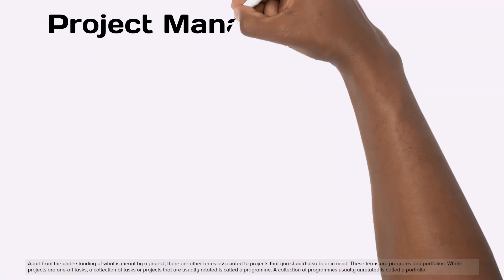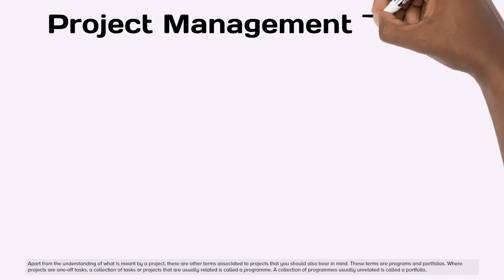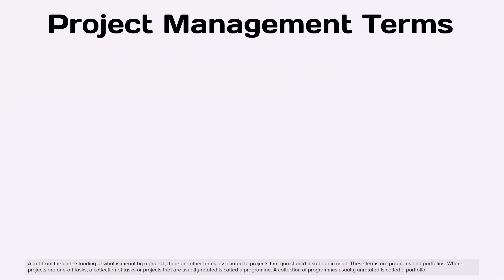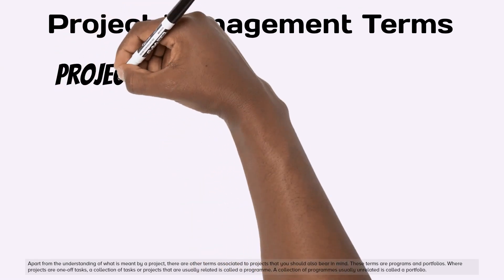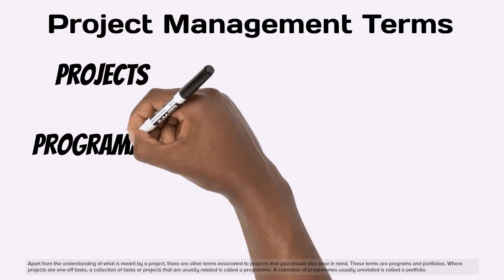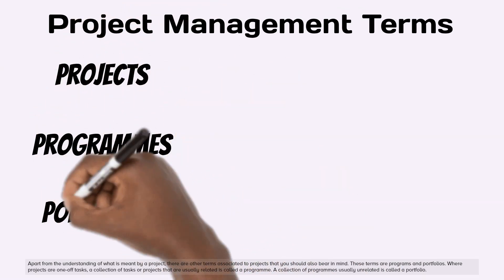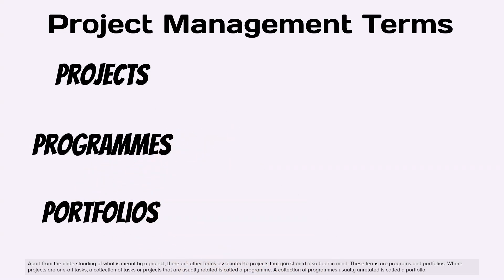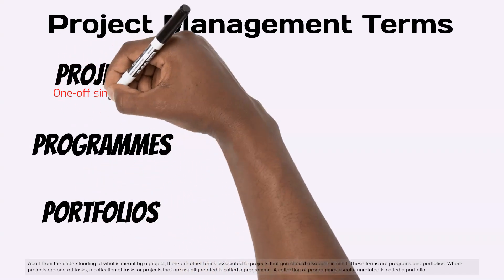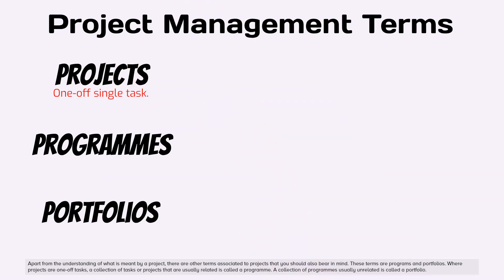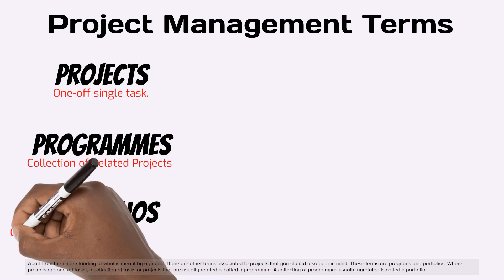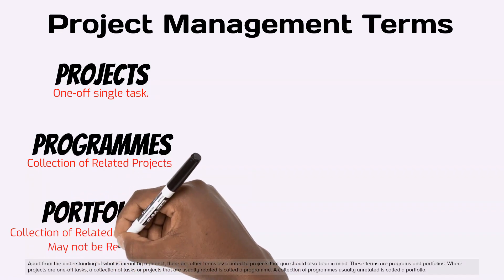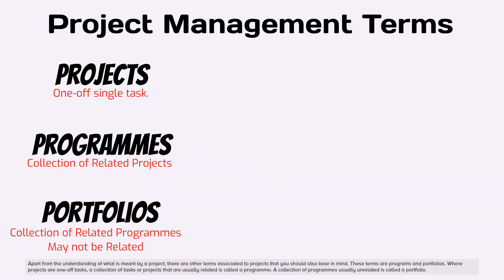Apart from the understanding of what is meant by a project, there are other terms associated with projects that you should also bear in mind. These terms are programs and portfolios. Where projects are one-off tasks, a collection of tasks or projects that are usually related is called a program. A collection of programs, usually unrelated, is called a portfolio.